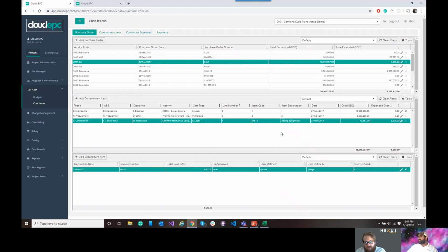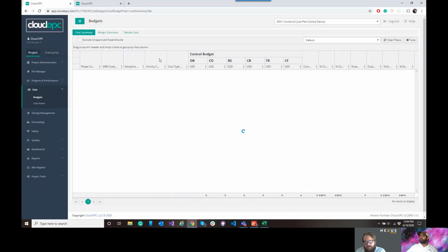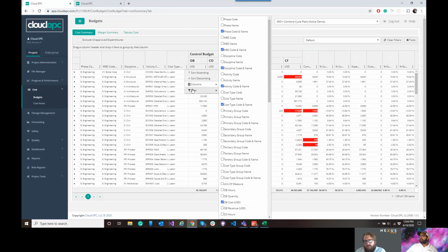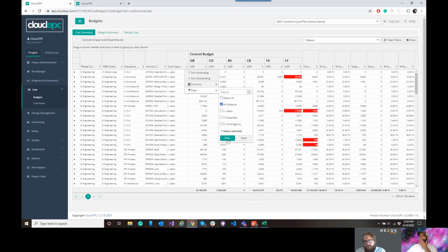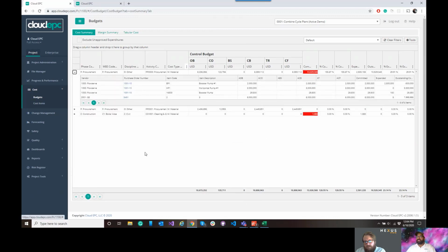And so we can see from there how it rolls up. The sum of all the invoices rolls up to the commitment line items, which roll up to a purchase order or subcontract level of total commitments and expenditures. All of those cost codings then get rolled up to our budgeting structure and show up as a commitment in the commitment column. And so if we were to filter on, let's just say material, I don't actually remember the exact line we were looking at, but in this example, here's our GE contract again.